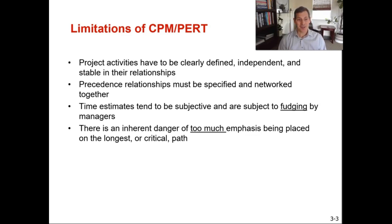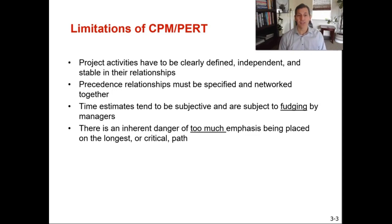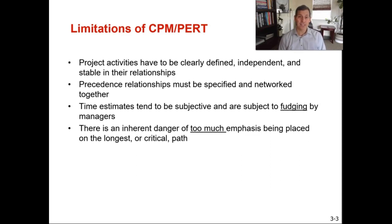Time estimates tend to be subjective and are subject to fudging by managers — sometimes intentionally, sometimes unintentionally. With time estimates, people are generally optimistic. If I say something's going to take me two weeks to complete, it might take me three. It's just the nature of how people estimate their time. Sometimes companies intentionally give poor data. My wife used to work for a construction firm, and they would say whatever they needed to win the job — if someone wanted a project completed in three months and they thought it would take four, they would just say three months. That's unethical, but that's what they did to win the business.